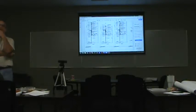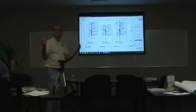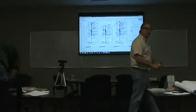You see that? So do I really need to have that metal stud up? Not really. Okay. This is where you coordinate your details. We got steel that is actually supporting the blocking, and the metal studs are infill, but you're exactly right. A lot of times you'll have a parapet wall go up, you got to have that wall before you put the nailers on. You got to sheathe it too, though. Well, you know how thick your sheathing is. I'm not saying, as a practical matter, you're probably going to let the guy sheathe up, okay? But are they truly dependent on each other? No, they're not. Each one of these activities could run at the same time if we wanted them to, right?